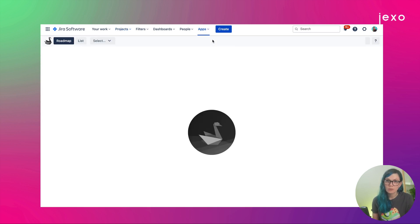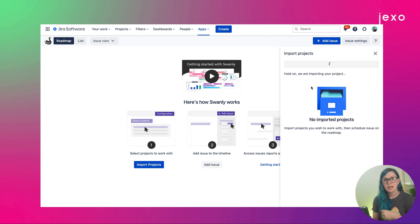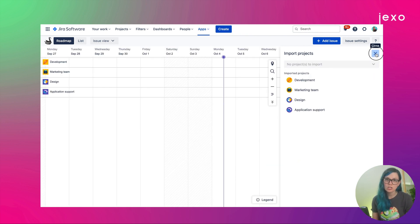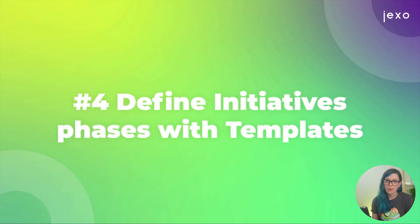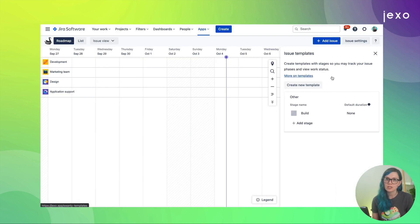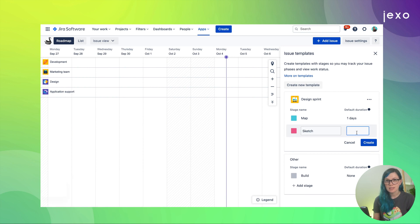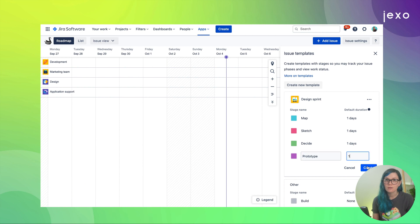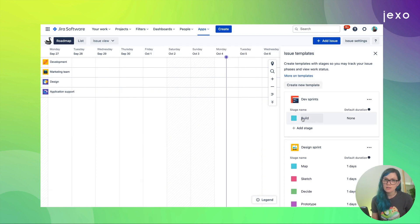When you come to Swanly, the first thing you need to do is decide which view to use — issues or releases. Because I created my initiatives as epics, I'll use the issue view. I need to import the project in Swanly and then I'll be able to see projects as swimlanes on the timeline, together with the issues I created under the plus add issue panel. There is one feature in Swanly I can use to create my roadmap much faster: templates. I can use templates to create stages and assign their default duration, which makes the roadmapping process much faster.